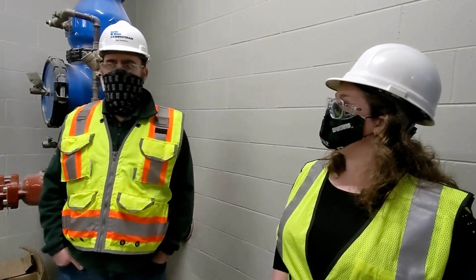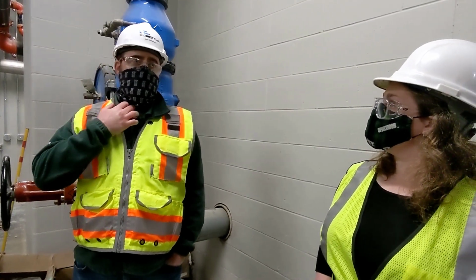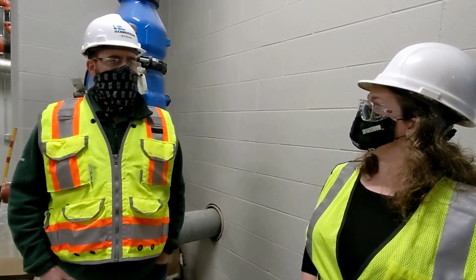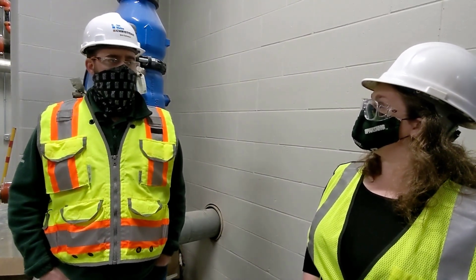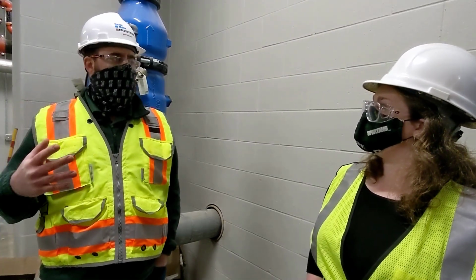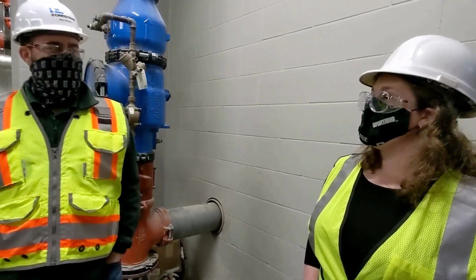All right. Coming up here in March, we are going to be filling the chilled water system, and we can really only start it once there's a load on the building. Otherwise, the equipment can't really take that. It needs that heat load to be able to create the cooling. I know it sounds funny, but it's true.